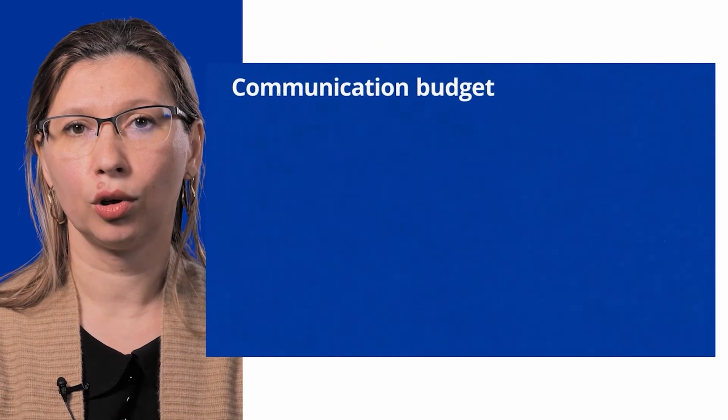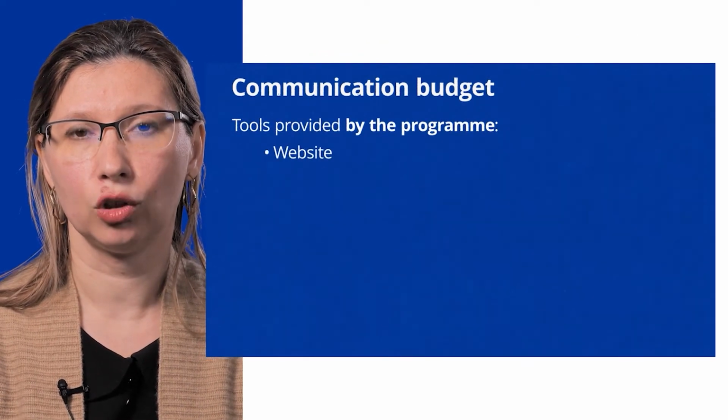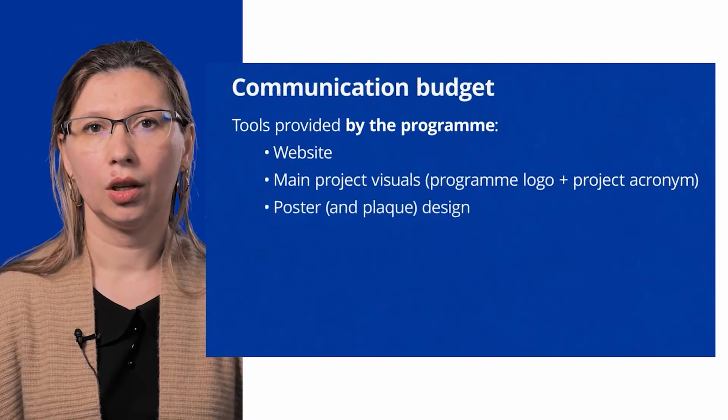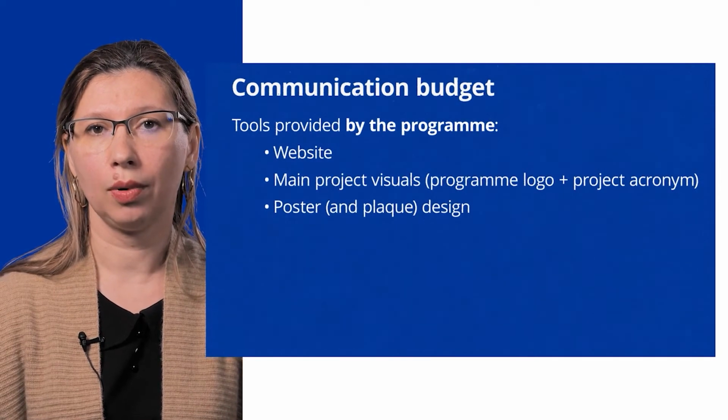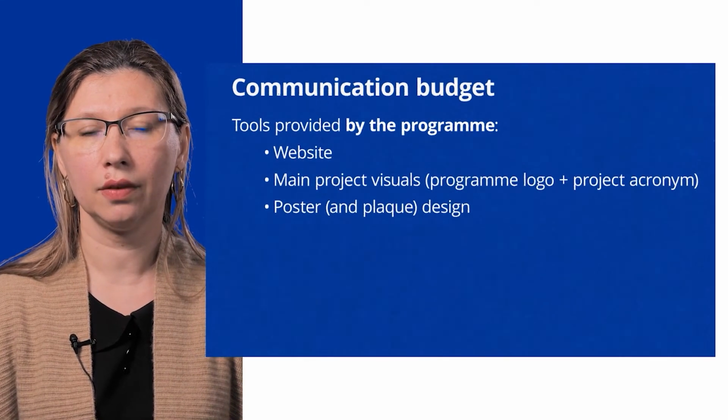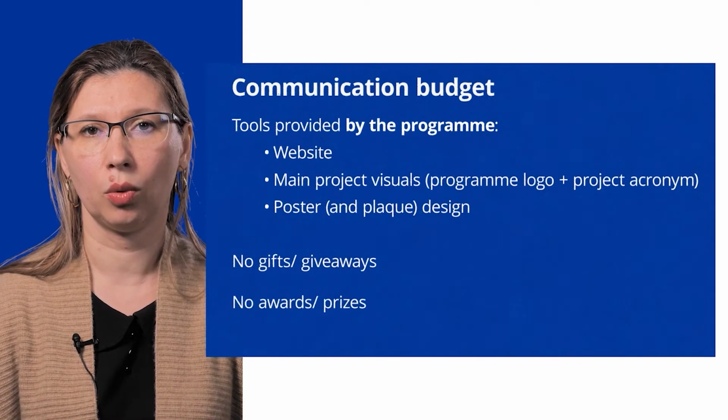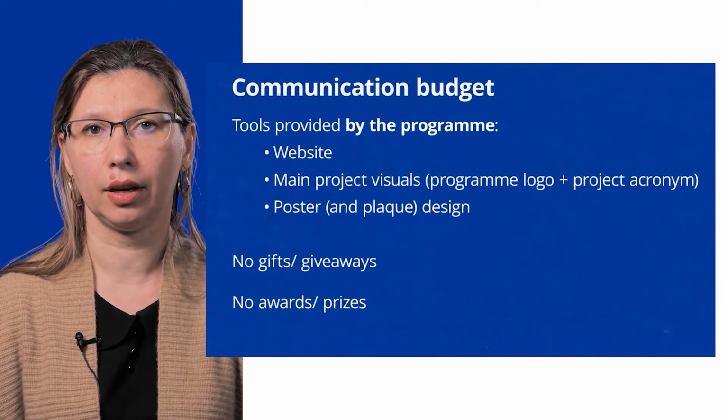Our communication team will support the projects in this programming period as well. You will not need to plan budget for the project website, the project's main visuals, or the design of the poster. Your communication strategy or plan should also not include gifts or giveaways, prizes or awards, as they are not eligible in the Interreg Europe program.